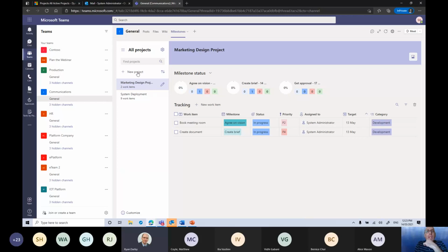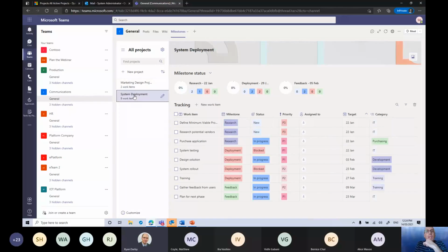What we have here is we can create projects. So I've got 2 projects over here. Let's go to this one, lots of milestones in it. This one is the demo one out of the box. You can create milestones. So these are milestones that run along the top. And these little squares here show me where we are, so the colors indicate not started all the way through to green as you're done. You don't want to be this pink color because that means you're late. They're telling you how many subtasks or work items fall underneath the milestone you're actually dealing with.